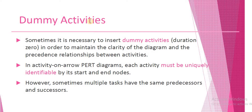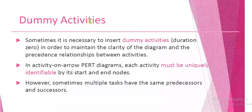In the previous tutorial, we learned about the classification of PERT diagrams. There are two kinds of PERT diagrams: activity on node and activity on arrow diagrams. In the characteristics of activity on arrow diagrams, we have seen that in some special cases we have to use dummy activities. There is no use of dummy activities in activity on node diagrams.